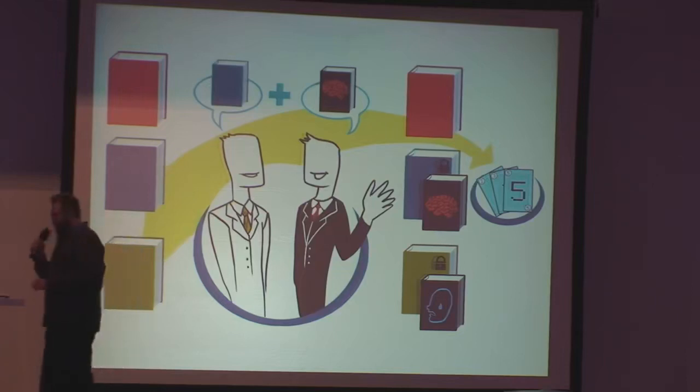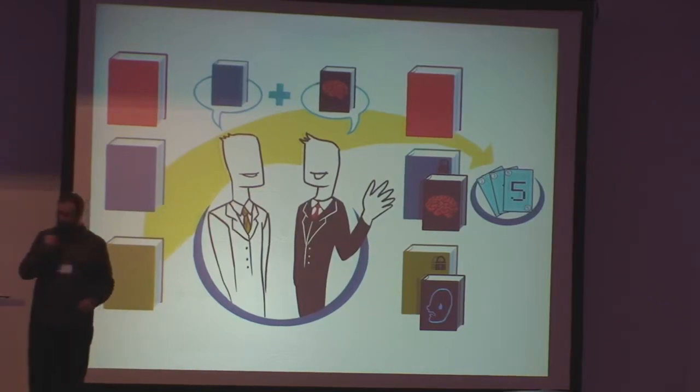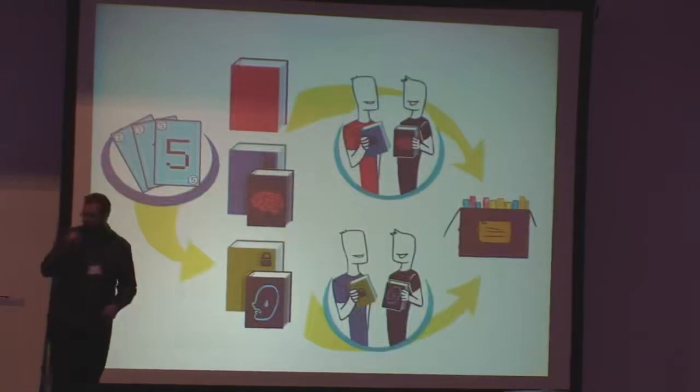So this was a big improvement over the previous sort of, you need to get sign off. This was much more detailed. After those stories had been properly groomed and now security groomed, they could be fed into the planning meeting. Then coming out of the planning meeting, we now have formal tasks for developers as well as formal tasks for the security team, for the security engineers.